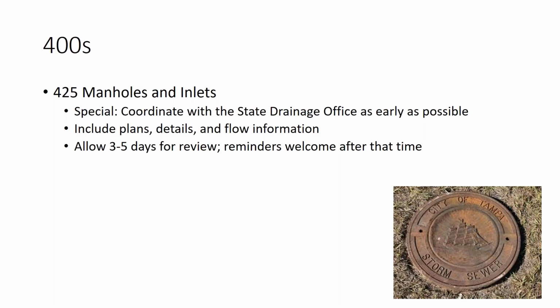including the flow information for the surrounding water, what's coming in and what could be going away elsewhere. So if you would please provide those details and allow 3 to 5 days for the state drainage office to review. After that, a friendly reminder is always welcome.